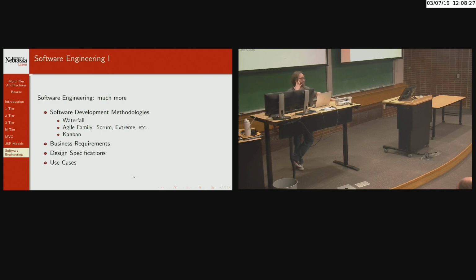Kanban is another way of doing this. You'll eventually have Kanban boards where you put up tasks on the Kanban board, and then you take down tasks, and this is what I'm working on right now. It's more at the individual level. And then once you're done with that task, you put it in the done pile, you go back to the Kanban board and say, I'm going to work on that task next.